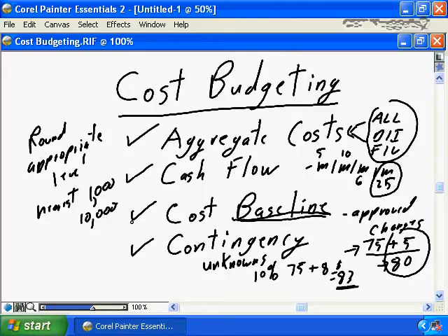If you develop a cost budget that says, my total project budget is $75,321.19, no one is even going to look at the lower level numbers, and it actually gives a false impression that instead of being measured that your project delivers in the range of $75,000 or more appropriately in the range of $83,000, they're going to expect your project to deliver down to the dollars and cents.